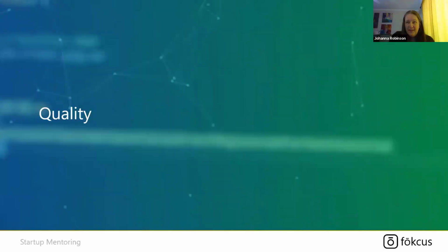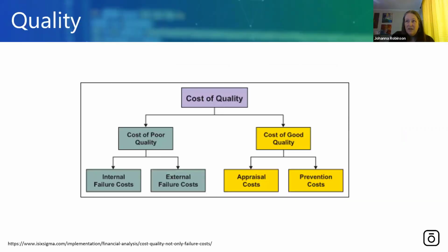Okay, I'll keep going. So here's quality. I really just want to have this conversation. It's a decision that you're going to have to make. Having quality costs something, and not having quality costs something. There's no free here. If you do it quick and dirty, the cost is that you might have to do it over, or your team might get discouraged because they have some failure points, or a client might get frustrated, and that could be embarrassing, and that could cost you a relationship.